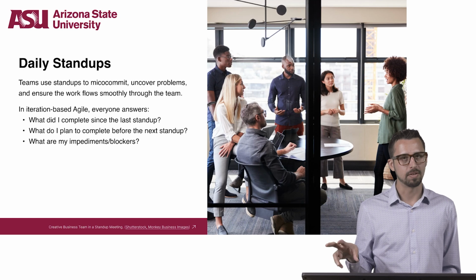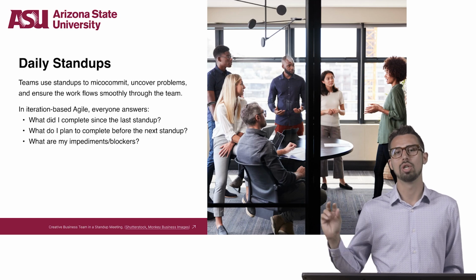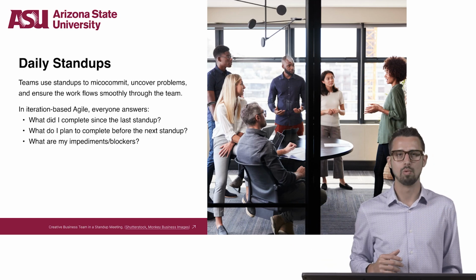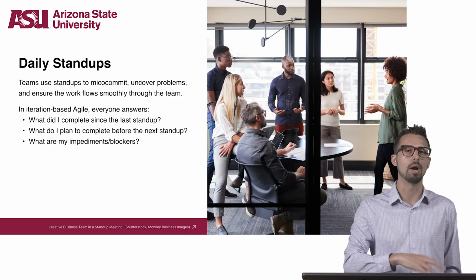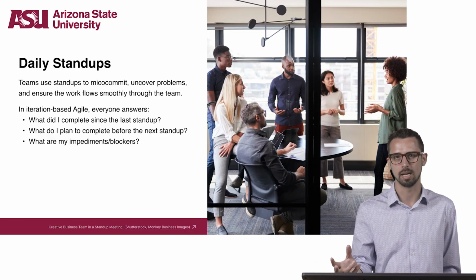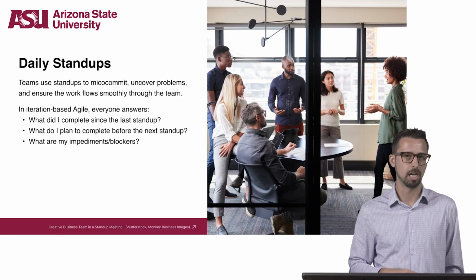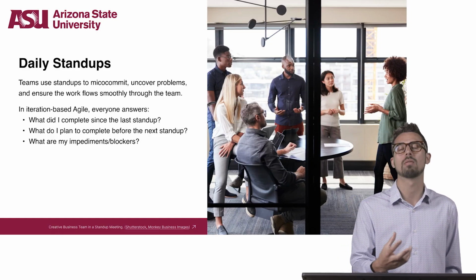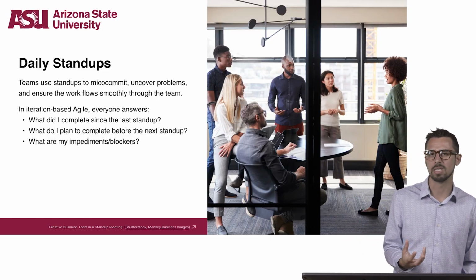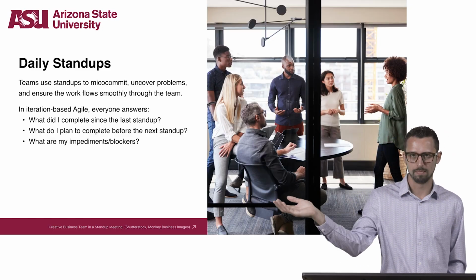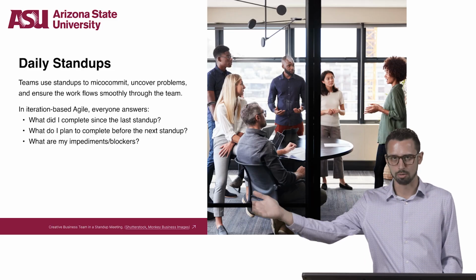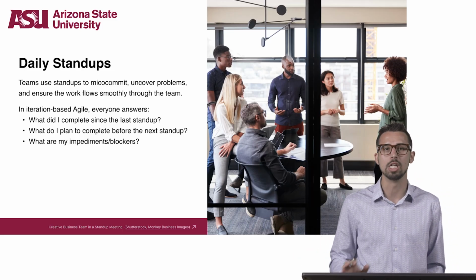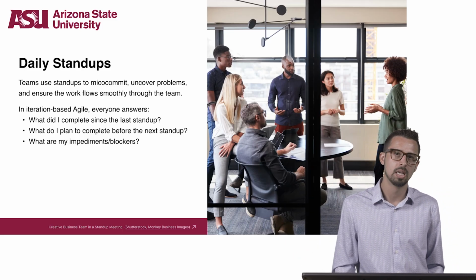The purpose of a stand-up is that the team should walk the task board in some way, and anyone from the team can facilitate the stand-up. It doesn't have to be a project manager, it can be anyone. And when I say walk the task board, even if it's a digital task board, you can look at it and just walk through it step by step and see what each card is on the task board.